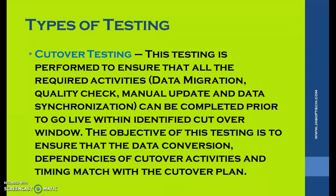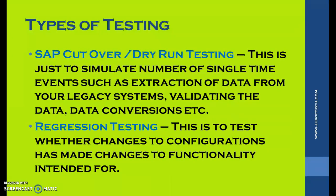Cutover testing is performed to ensure that all required activities — data migration, quality check, manual updates, and data synchronization — can be completed prior to go-live within the identified cutover window. The objective is to ensure that data conversion, dependencies of cutover activities, and timing match with the cutover plan. This is more time-related, focused on completing configurations and developments in the implementation project.